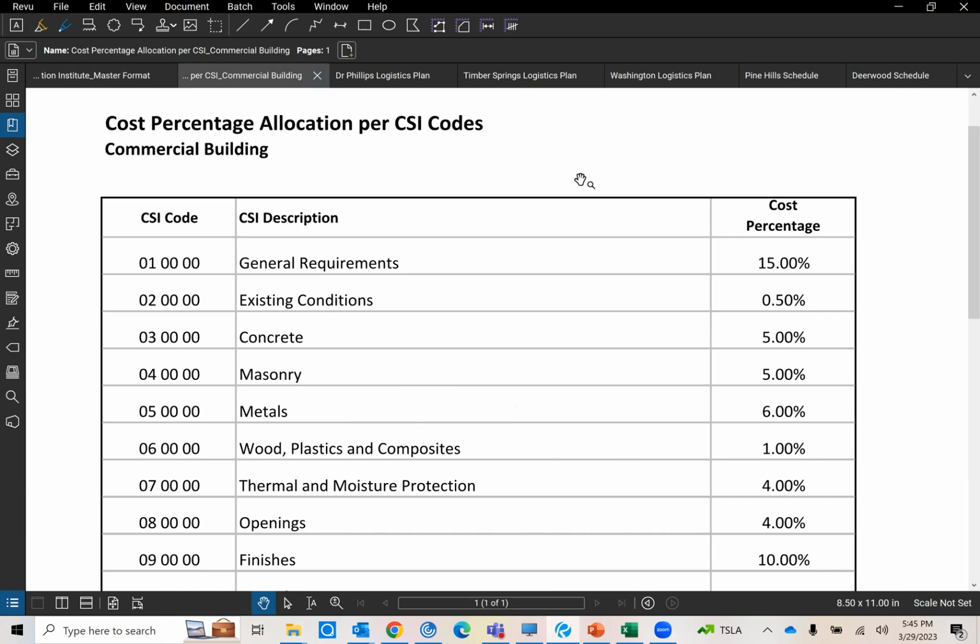Okay. Go ahead. Yeah, so just for rough numbers, $400 a square foot, and if you say it's a 3,000 square foot addition, you're looking at 1.2 million. So just giving you guys a rule of thumb: whatever the square footage of your project will be, you could use that as a good measurement. Absolutely.